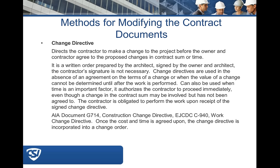Once the CCD is issued and the contractor starts work, he still needs to prepare a proposal request. He responds with the proposal, you agree to the time and cost, and that is then incorporated into a change order that all three parties sign.